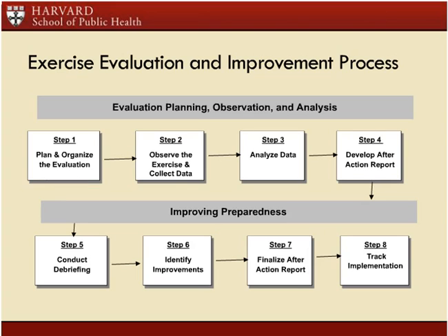All too commonly, people get all the way to the end of the exercise process. They have come up with some objectives, they've written a script, they've invited participants, they've set the date, they've even named a caterer, and then they start to think about evaluation. And really, unfortunately, that significantly limits your evaluation process. The scenario that you write, even the objectives that you write, need to be created with an eye to evaluation so that you know you will be able to evaluate what you're trying to observe. Otherwise, again, if it gets shoehorned in at the end, it usually is suboptimal.